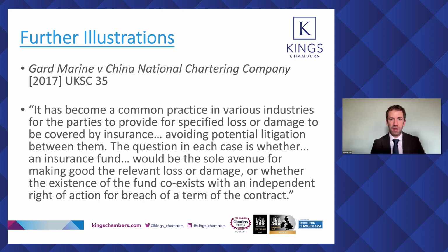It's become common practice in various industries for the parties to provide for specified loss or damage to be covered by insurance, avoiding potential litigation between them. The question in each case is whether an insurance fund would be the sole avenue for making good the relevant loss or damage, or whether the existence of the fund coexists with an independent right of action for breach of a term of the contract.